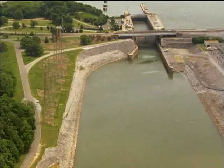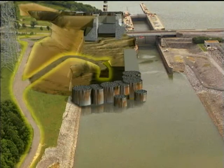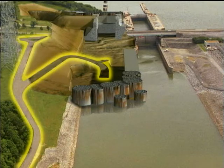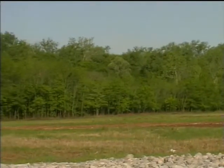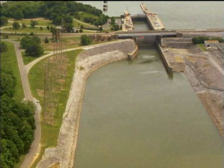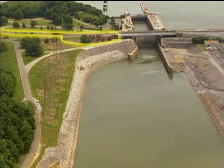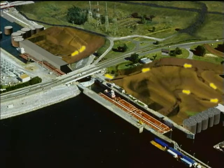A similar approach was used in developing alternative access routes for downstream and middle lock excavation and construction. The Vulcan Disposal Area will receive all downstream and middle lock excavation. Constrained by the TVA transmission towers, the existing highway and railroad embankment, and the severely sloped terrain on the east bank, alternatives were developed to maintain uninterrupted on-site access for concurrent upstream and downstream work.